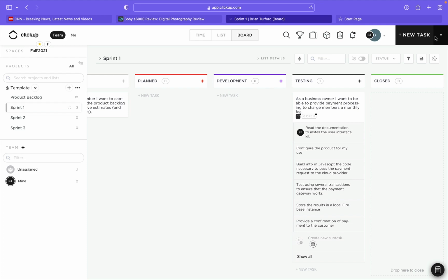The other thing you need to look at is a sprint retrospective, because it kind of goes hand in glove with the sprint plan. The sprint retrospective, I actually have a separate video for, but I'm going to at least introduce the concept during this video. So what you want to be able to do with a sprint retrospective is two things. You want to be able to capture the time that you've spent working on a project, for example, the tasks or the subtasks within a sprint. You want to capture that information, but you also want to be able to identify any issues that are impeding your progress of moving the project forward on a real-time basis. So in essence, a sprint retrospective, I kind of think of it as a fancy timesheet.